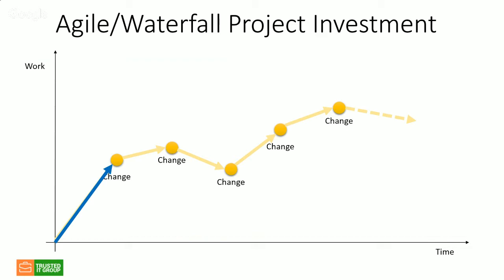And we keep doing the work. We keep doing the work. We hit the change. And what happens with the waterfall project, we don't necessarily react to the change as quickly as the Agile project. We would still probably go through some formal change request or governance within the project, which tells us whether there's a major change or not major change in the project, and we need to file a change request, we need to route that through an approval process, yada yada yada. So until we know it, we spend another 2 weeks working in the same direction, but having in mind that change that happened earlier.